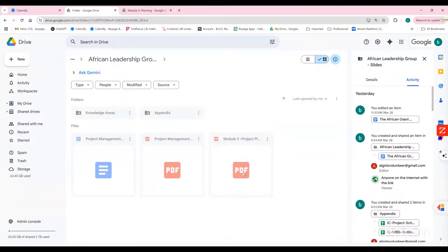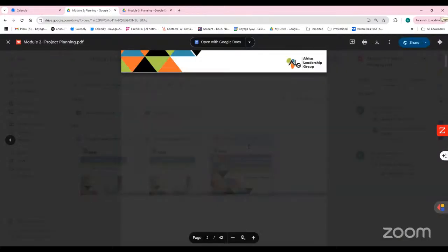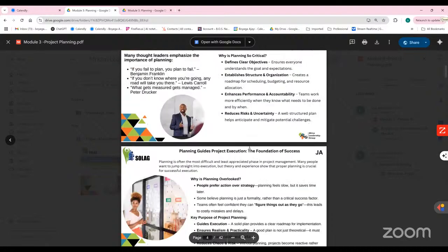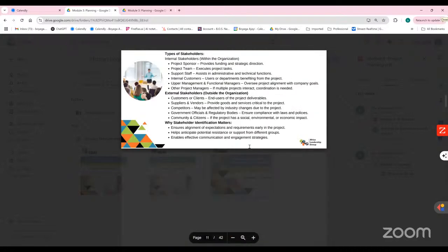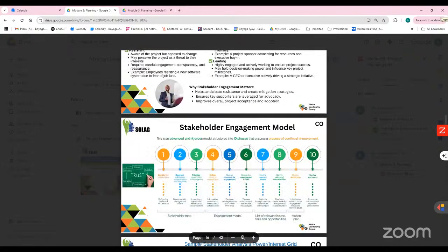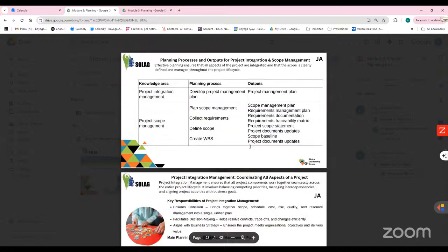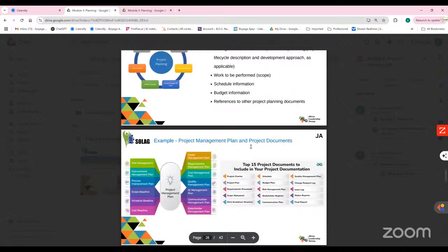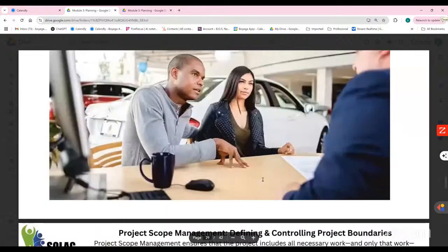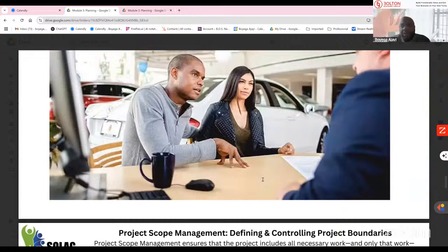Thank you so much. The key thing I learned last week was how to create key activities that will give the required deliverables based on the project objectives, and also schedule the key activities, have a timeline. For instance, if the project is going to be 6 months, you schedule the key activities to take up to like 5 months. You leave 1 month for any eventuality, so that if anything comes up, you can use the remaining 1 month to tidy them up before the project commissioning. Those were the key things I learned last week.